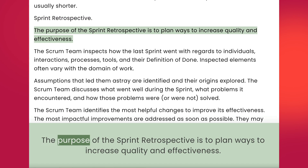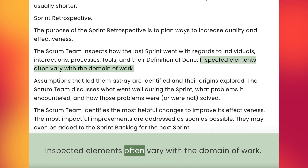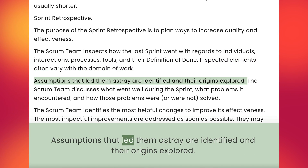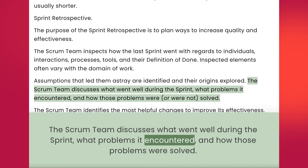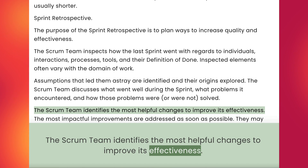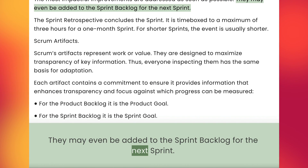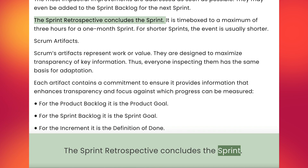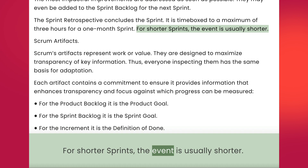Sprint Retrospective. The purpose of the sprint retrospective is to plan ways to increase quality and effectiveness. The Scrum team inspects how the last sprint went with regards to individuals, interactions, processes, tools, and their definition of done. Inspected elements often vary with the domain of work. Assumptions that led them astray are identified and their origins explored. The Scrum team discusses what went well during the sprint, what problems it encountered, and how those problems were solved. The Scrum team identifies the most helpful changes to improve its effectiveness. The most impactful improvements are addressed as soon as possible and may even be added to the sprint backlog for the next sprint. The sprint retrospective concludes the sprint and is time-boxed to a maximum of three hours for a one-month sprint. For shorter sprints, the event is usually shorter.